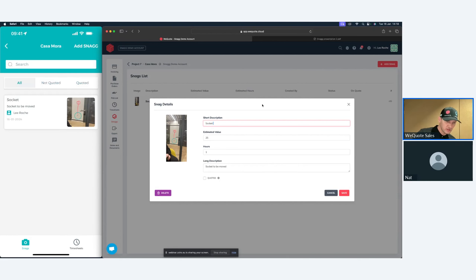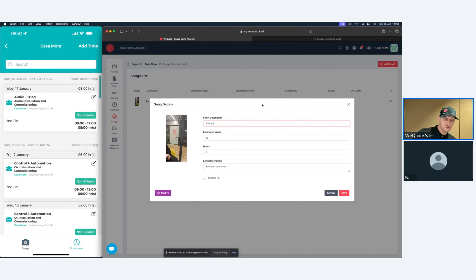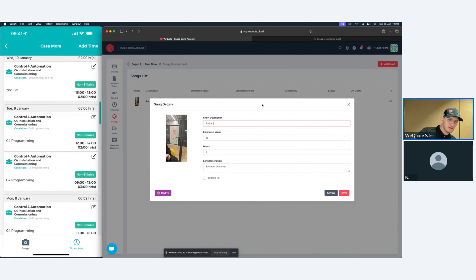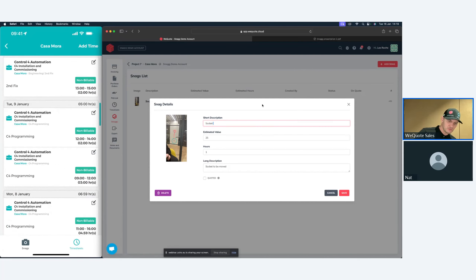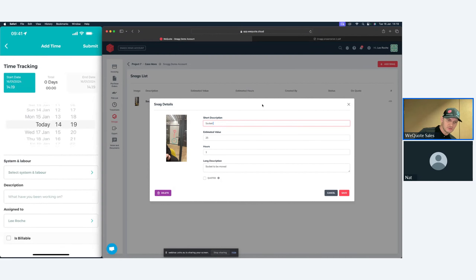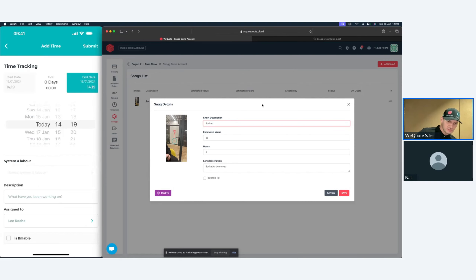Underneath the project in the app you also have timesheets. Just to be clear — Snag is at the engineer level, so you won't see all engineers' timesheets from the Snag app; you'll do that from WeQuote. This view breaks down every single one of their time entries. You can see Tuesday the 9th of January, working on multiple different systems clocked in at different times. Engineers can also manually add time entries — just select a start time, it automatically goes to today's date, select an end time, and choose the system they were working on.